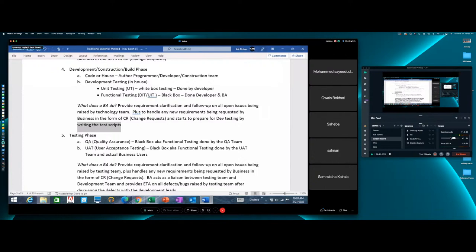You understand? Yes. So that is how you know that the login module will be available for you to test on, say, March 15th. You got it? So you should be tracking to that date, saying that on March 15th, the login module should be ready to test, and you need to have your test cases ready to execute on that date.